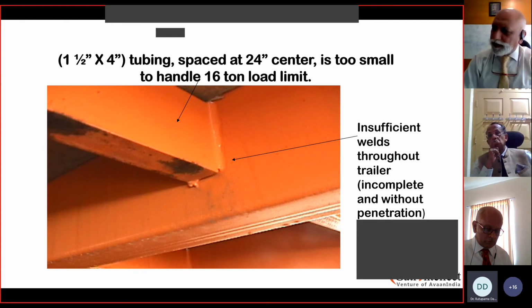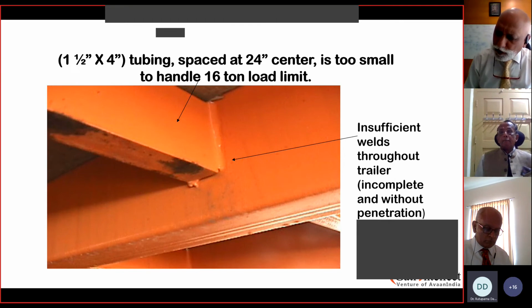compromising on safety. The standard practice in such cases is that in specialized equipment transportation, the contractor will nominate a third-party surveyor to inspect the strengthening done by the vendor on the trailer, whether it is adequately strong to safely transport the material. This is not clear, and that is the missing link we see in our contract terms and in the execution process. Next one.